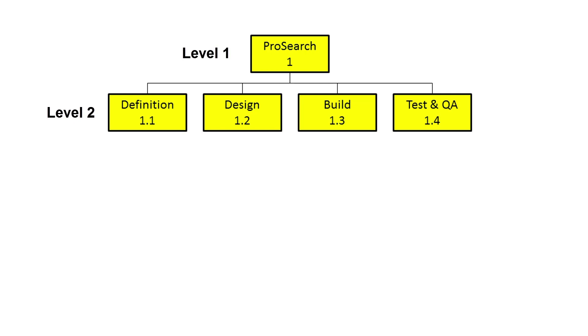With all the major deliverables identified for the second level, we now need to see if any of these elements should be broken down further. If so, these elements will be on the third level of our WBS. We decide that Definition and Design need no further breakdown.